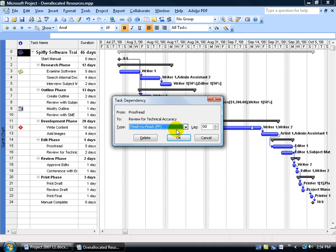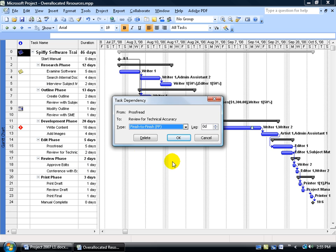If you remember that phrase from an earlier training video, you're looking at the successor and saying: the predecessor must finish before this task can finish. In other words, I need to finish proofreading before I can finish reviewing what's been proofread for technical accuracy. The task takes five days, but I don't have to wait the full five days — I can start reviewing pages as they're proofread, just making sure the proofreading finishes before I finish reviewing for technical accuracy.